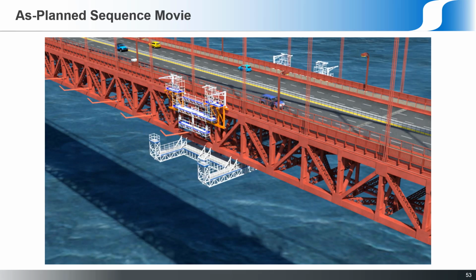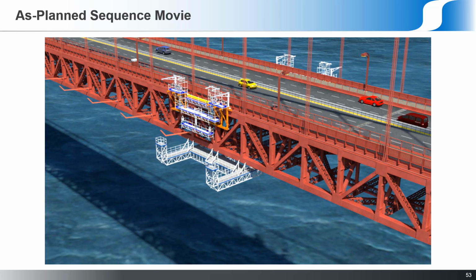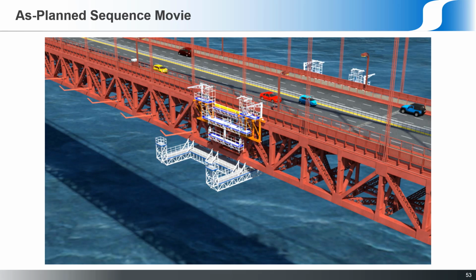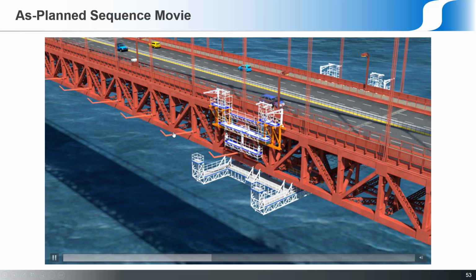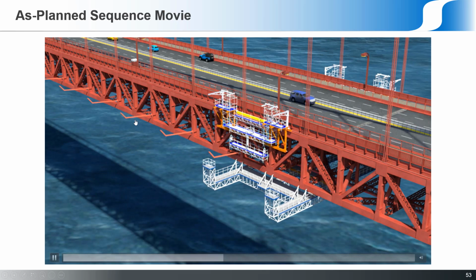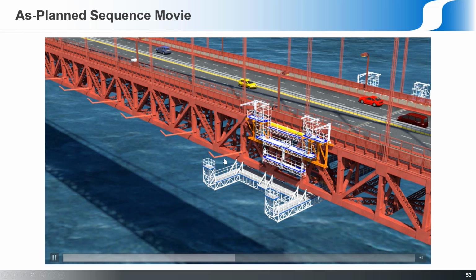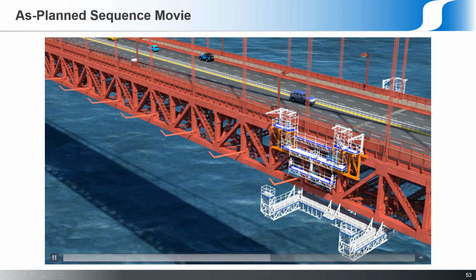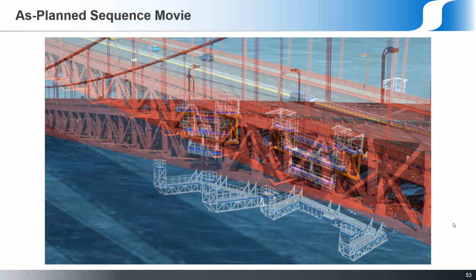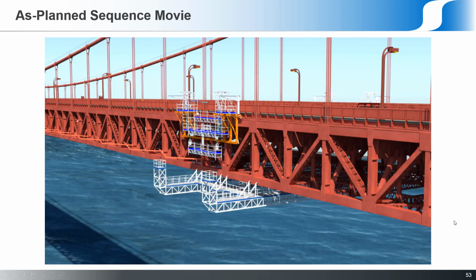So that was a plan to move down the bridge a section at a time, do everything you need, do all the changes. The only work that was planned as the last pass was to come along with a reel of net material and actually string the nets on this. But that had to wait until all the net supports were up. So that was just the final finished piece to this thing.